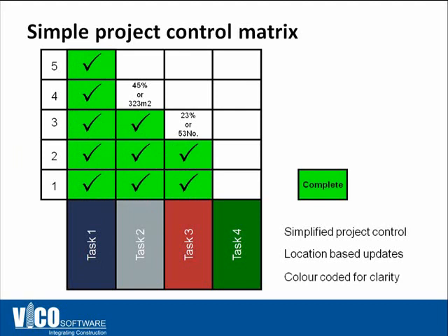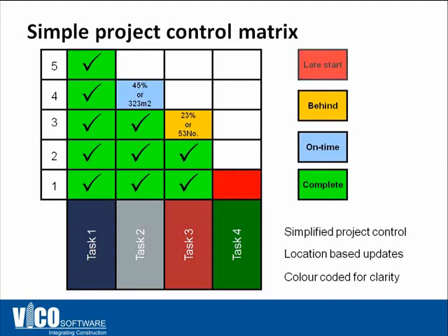What locations are a little bit behind or ongoing, and Control will automatically highlight the locations that will have a late start, that will have an impact because of the delays that you just entered into the system on previous locations.